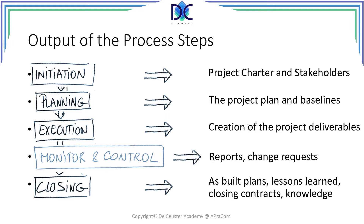Finally we come to closing, where we close the project, where we make the as-built plans, look at lessons learned, close contracts and store the knowledge we obtain during the project. Closing is very important because all the information will help us later to improve our project management.